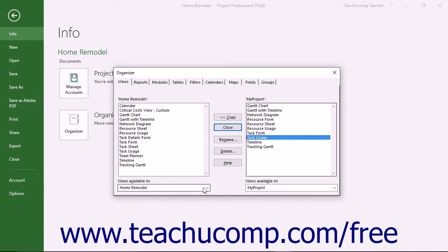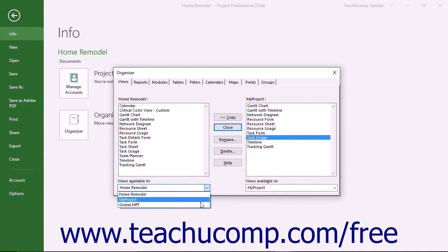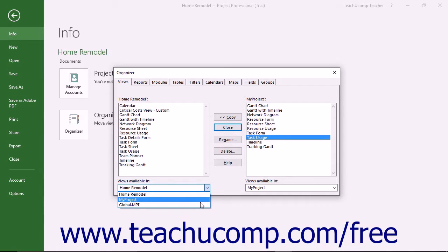If you copy objects into either the Global MPT or Global Plus Non-Cached Enterprise project files, you are actually copying objects into the global template used to create new project files created in the future.